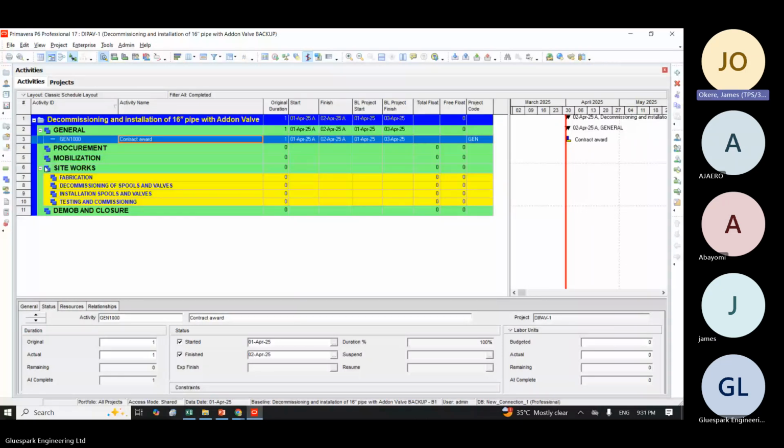Okay, so I will try and share that video tomorrow. So please go through the video. Linking of activity is one. We don't have how to link critical activity. Yours is just to link all your activities. Those that will fall in the critical path will fall. You are not the one that will make them fall. Just do your linking. When you reschedule, those that belong to the critical path will be red. The ones that are not will be green.